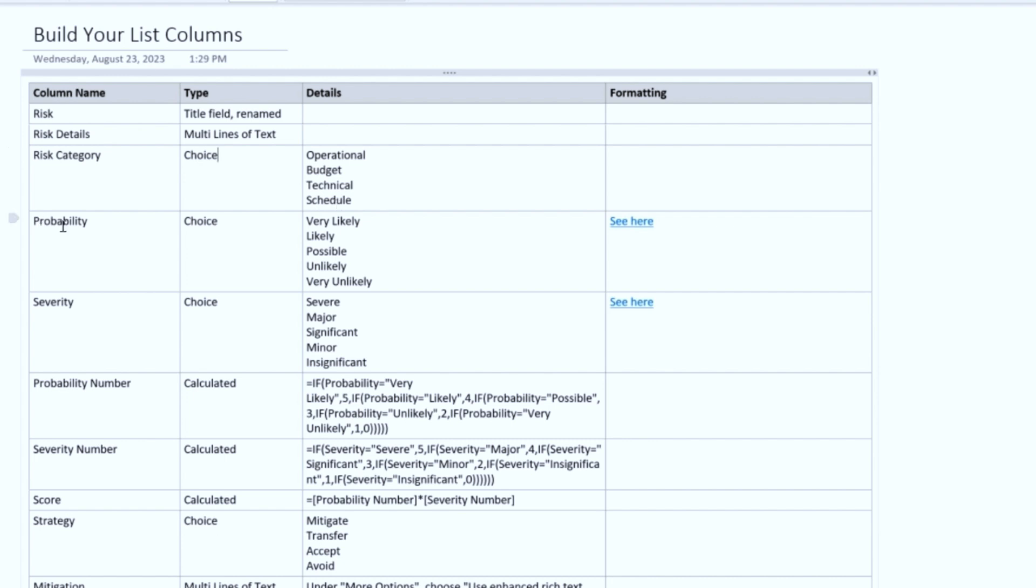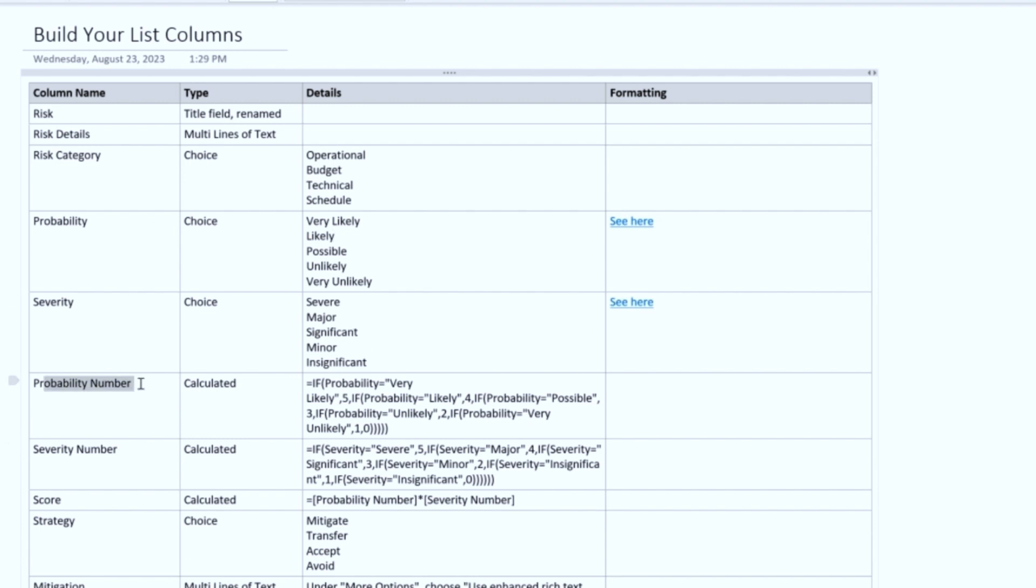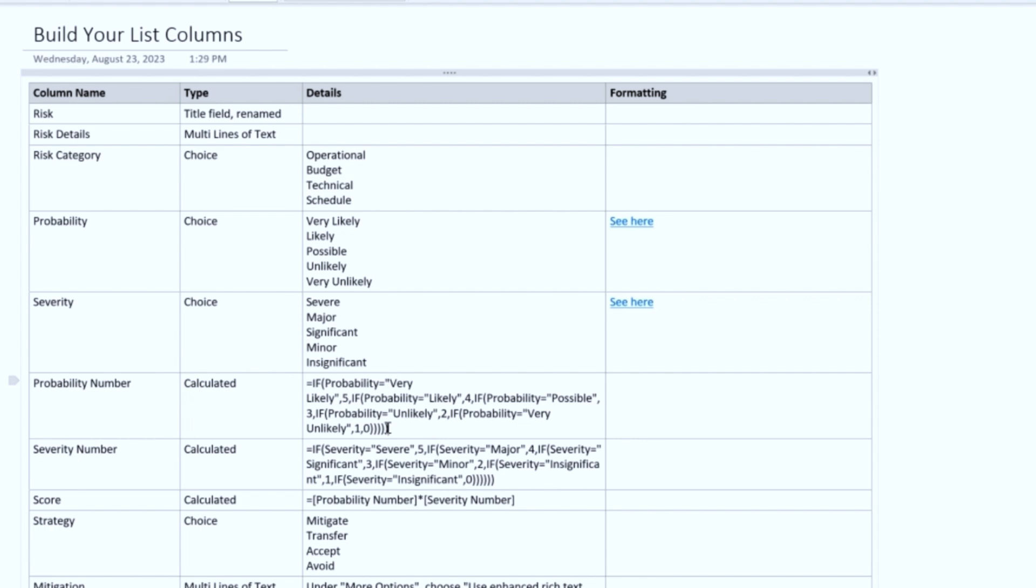Probability and Severity are also going to be choice fields. And these are those choices: Very Likely, Likely, Possible, Unlikely, Very Unlikely. Severe, Major, Significant, Minor, Insignificant. Probability Number, Severity Number, and Score are all going to be calculated columns. You can put little pieces of code inside of a calculated column to make that column behave a little bit differently than normal columns. Just like in Excel, where you could put in little pieces of code and have your column do certain things. This is the same thing, except we do it in SharePoint.